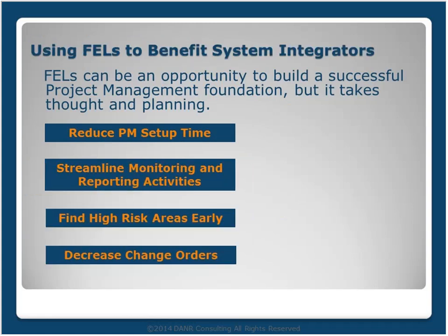So how do FELs benefit system integrators? Well, first of all, they present a great opportunity to build a successful project management foundation going into a project. When properly thought out and planned, FEL deliverables can benefit your organization by reducing project management setup time. If you've done your FEL in the right way, you already have the base documents that you'll need for your project management monitoring and reporting activities, and this will streamline those tasks.